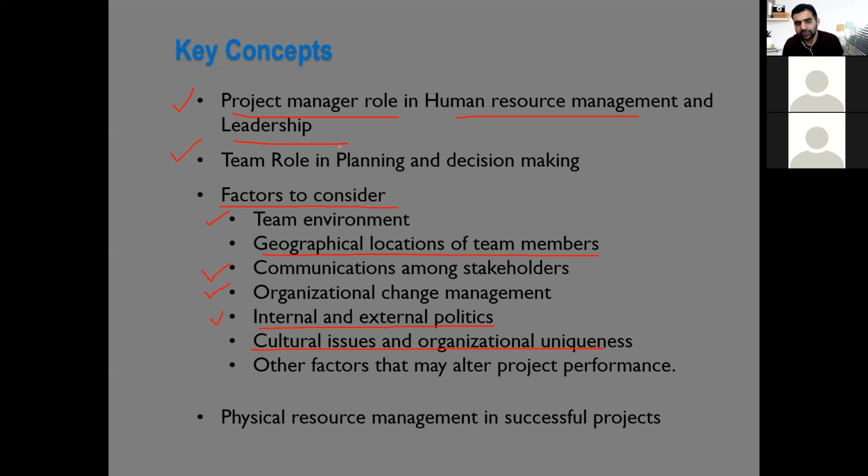Similarly, it is also very important that teams should be involved in planning and decision making. If the team is involved in planning, for example, planning for the scope definition, work breakdown structure, defining the activities, or making decisions, including developing the team charter or ground rules, then the team has good buy-in on the project plan, and they execute that plan wholeheartedly with motivation, because they developed that plan by themselves.